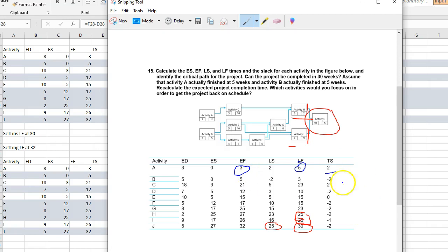And just kind of going through before, when we went through a chart like this, we could see that when we start here, this activity has 3 units, this activity is 5 units long, and that would tell us at this point in time that there are 2 units of slack. So the difference here is whether we put that slack at the end of it or at the beginning of it. And if we're going this direction, backwards with our late start, late finish, we're going to put that slack here instead of at the beginning, if that makes sense.